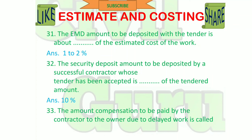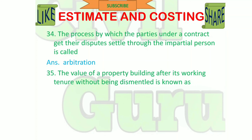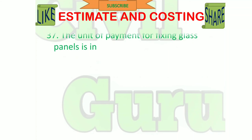The compensation to be paid by the contractor to the owner due to delayed work is called liquidated damages. The process by which parties under a contract get a dispute settled through an impartial person is called arbitration. The value of property after its working life without being dismantled is known as salvage value. The unit of measurement for steel work in trusses and its parts is quintal.